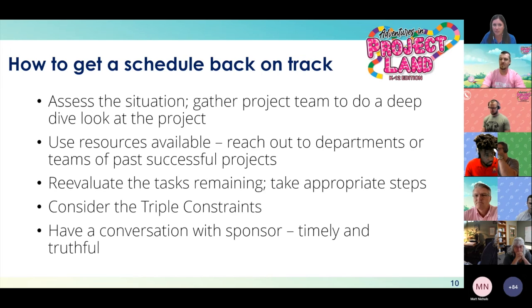If phases are dependent on one another, such as phase 1 must be completed before phase 2, this can introduce risk and cost, and the project can become more complex. Consider the triple constraints, cost, time, and scope, that were addressed yesterday. Reducing time or correcting the schedule will likely increase costs or require a reduced scope. These triple constraints are important as one will affect the other.